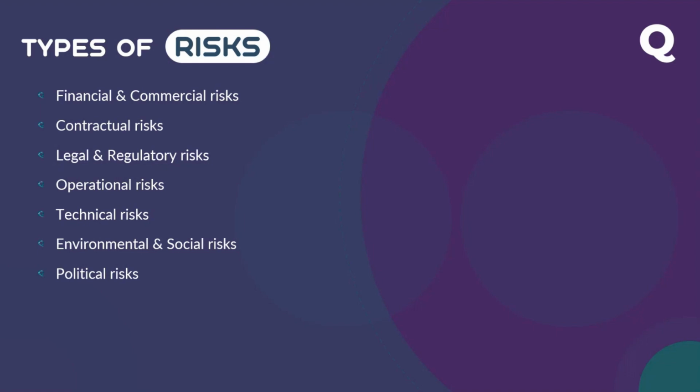Risk does not stop there. In post-contract also, there will be risk. Budget overrun issues are one of the very classic examples of cost or commercial risk in the construction stage. Wastage issues, productivity issues, abortive issues, progress related issues, payment to the subcontractor, subcontractor underperformance, and subcontractor payment terms.